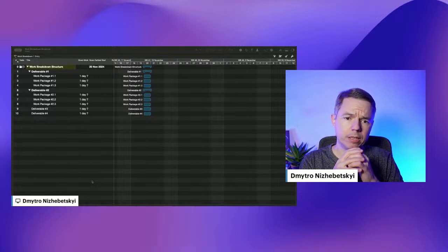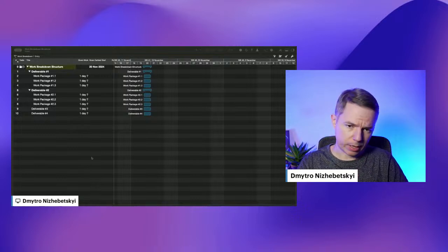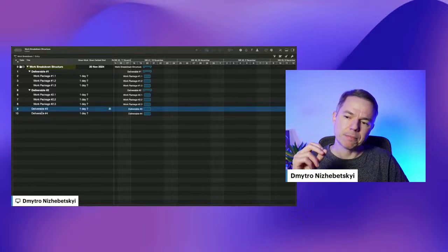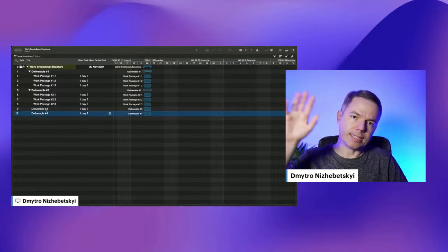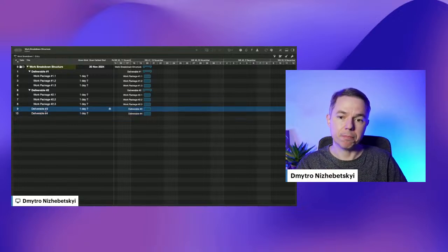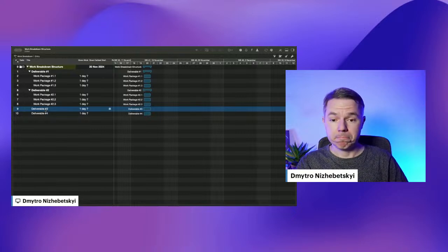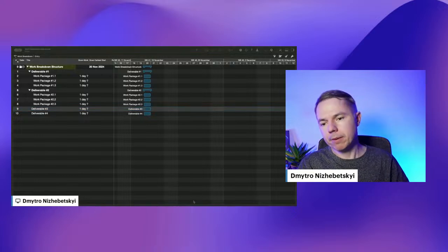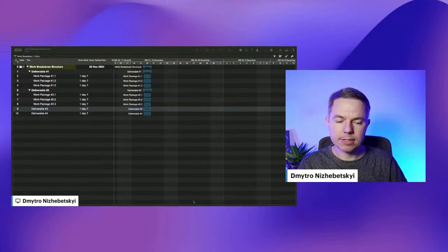So basically, if you are at the start of the project, and especially if it's an IT project, you should estimate and plan out the deliverables that are closer to the end with a lot of uncertainty, risks, and buffers, whatever you use in them, so that whatever the customer puts on you, whatever your stakeholders demand in terms of requirements, you will be able to fit into that and deliver some product that they request.